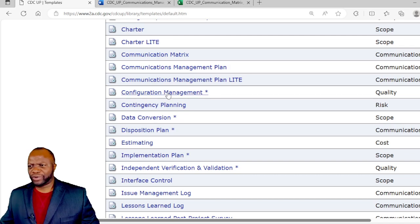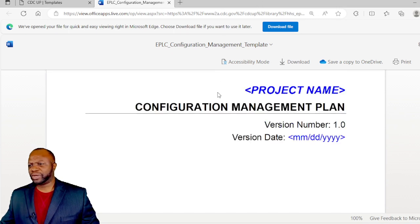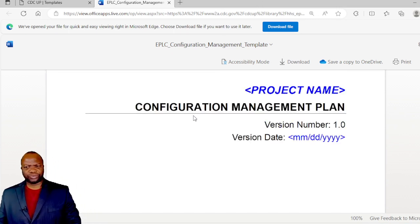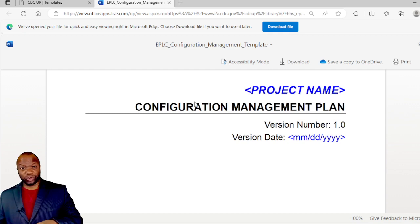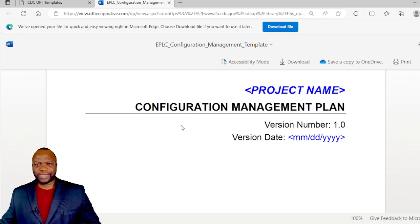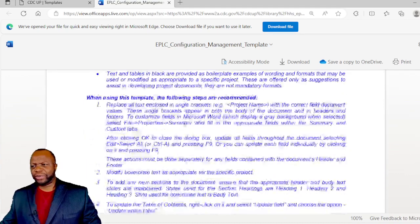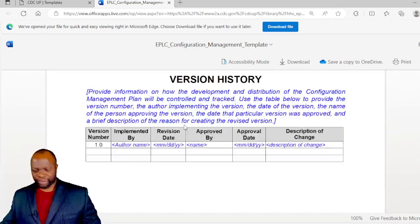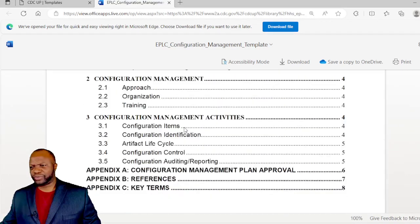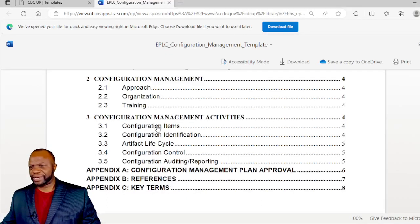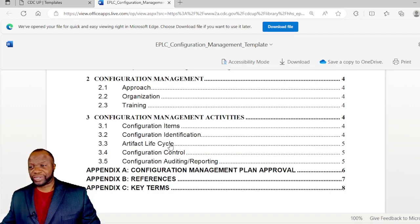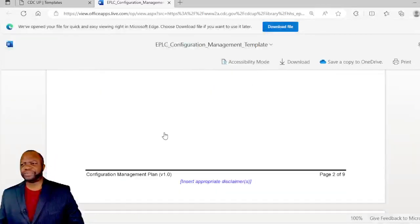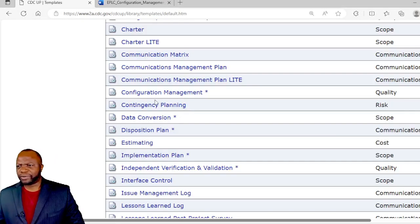We have a configuration management document here. Configuration is really all about the widgets and the artifacts, drawings in some cases, and which items are configurable and how you will track the versioning of them, in other words version control. Here you can see that term: configurable items, configuration items, configuration identification how it will be done, an artifact lifecycle. Because it's all about artifacts. Configuration management is all about artifacts.